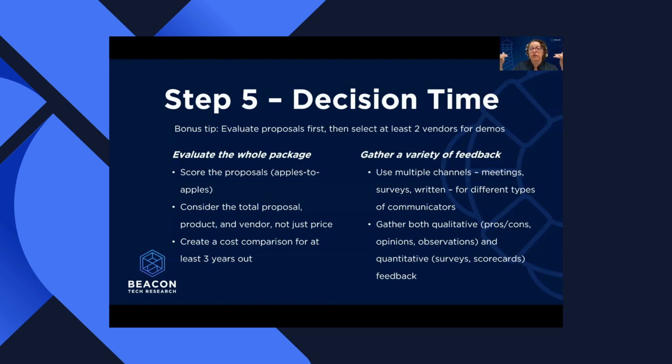Over a 3 or 5 year period, you can see what the total investment looks like, and whether those are actually equivalent. Sometimes the one that you think is going to be cheaper in the long run ends up being more expensive when you run it out 5 years. So that 3 to 5 year comparison is way more helpful than just the 1 year. And going back to the feedback, Dave's right, we're going to tell you to get feedback at each stage. And I would suggest that you do that in different ways.